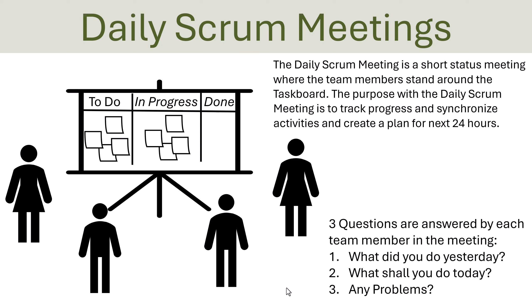During the sprint, the team also has daily Scrum meetings. The development team comes together typically early in the morning and stands in front of the task board. Each team member answers three questions: What did you do yesterday? What shall you do today? And do you have any problems? Each team member shows the tasks done since the last meeting and says which tasks they will focus on until the next meeting. That's the daily Scrum meeting, which is an important part of the Scrum method.